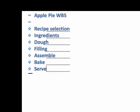Here you see what constitute the milestones. The hardest part in determining and making a breakdown structure is how detailed you get in breaking each milestone down into the given tasks you have to perform. So I'm going to open this up to level two — I've pre-populated this. Here you see my milestones: recipe selection, ingredients, dough, filling, assemble, bake, and serve.